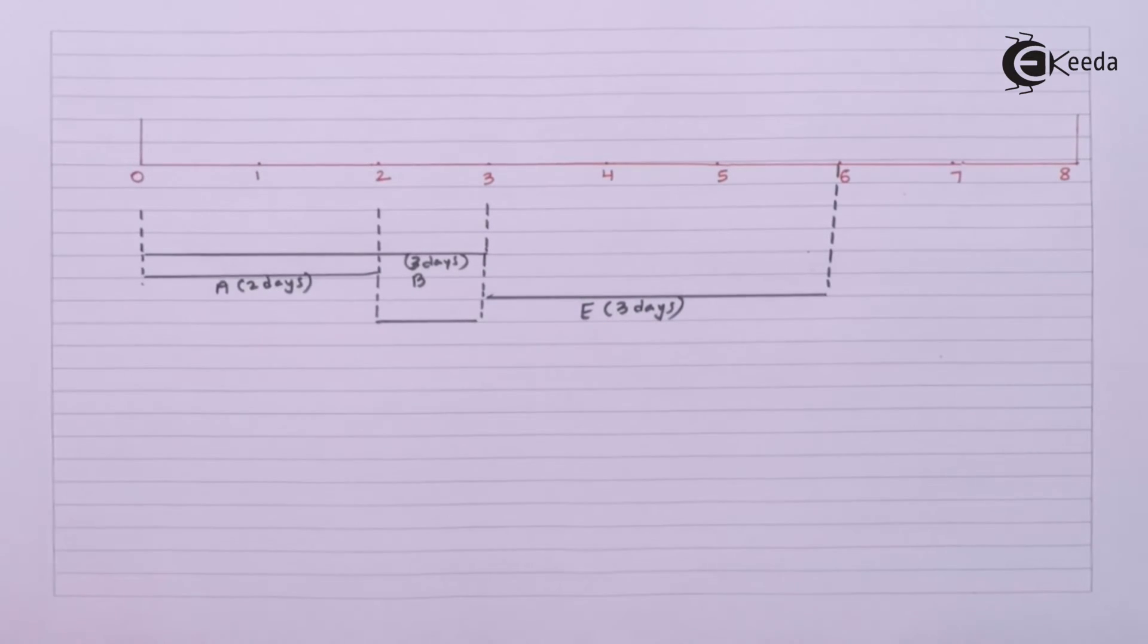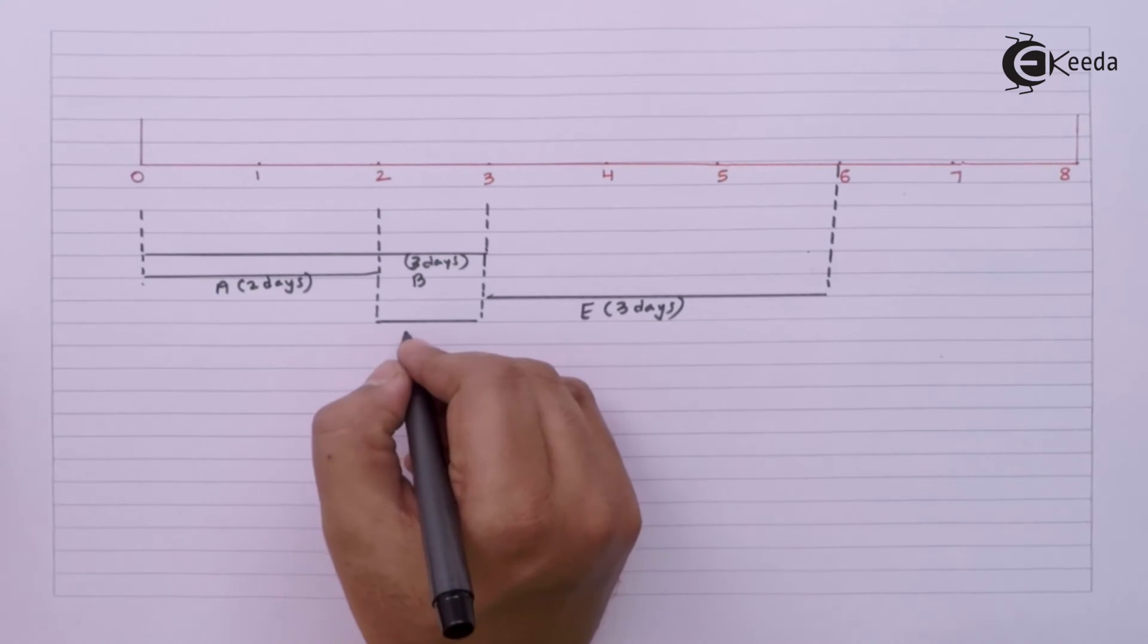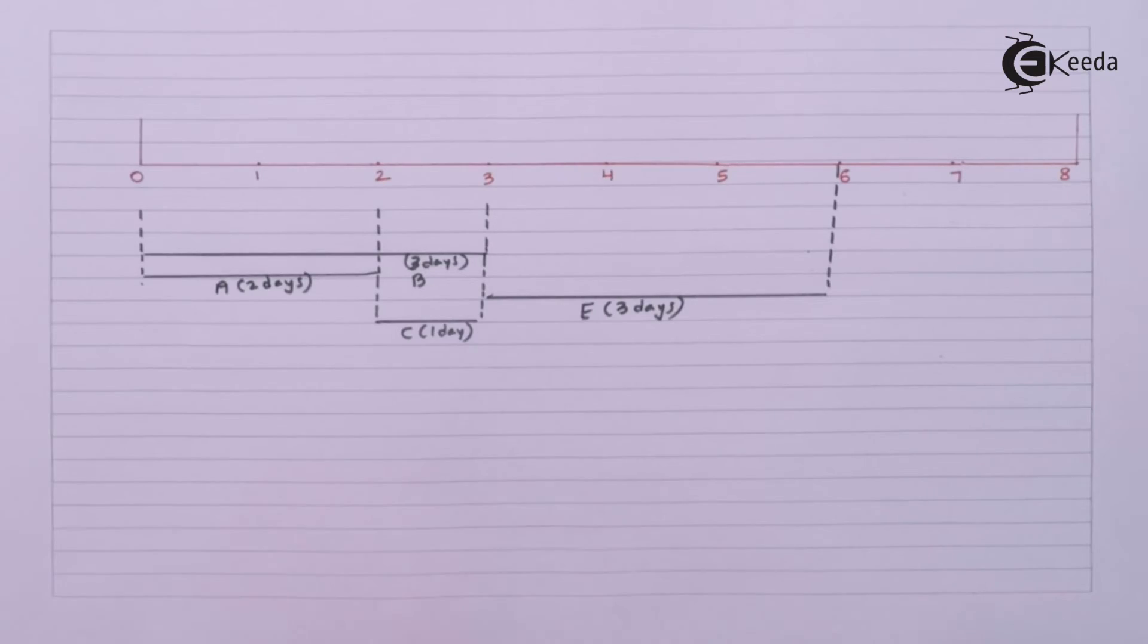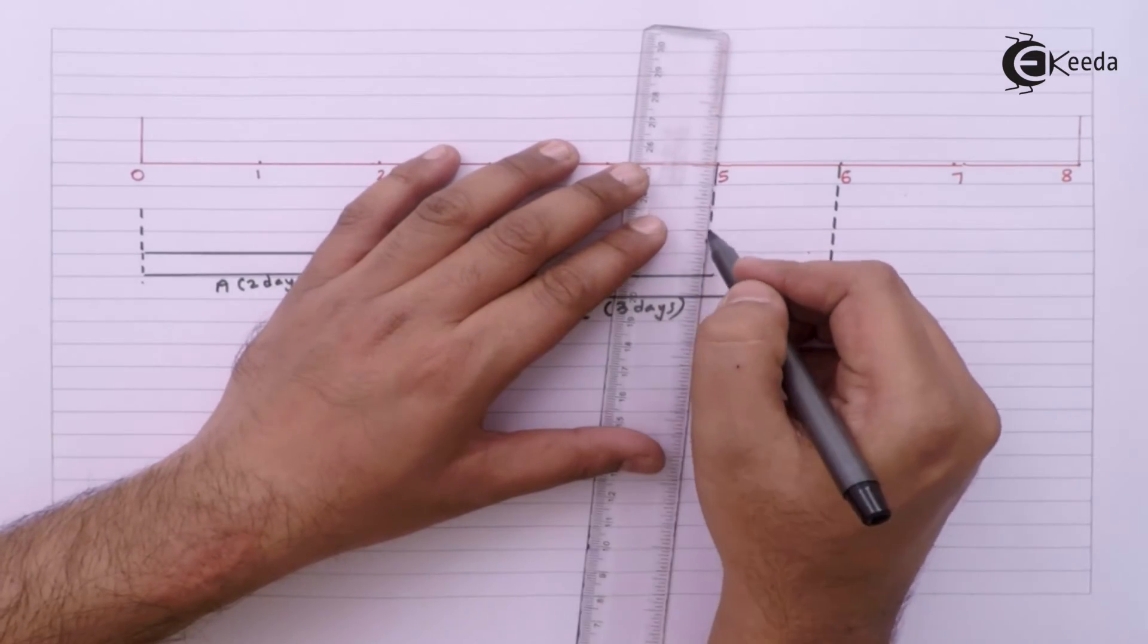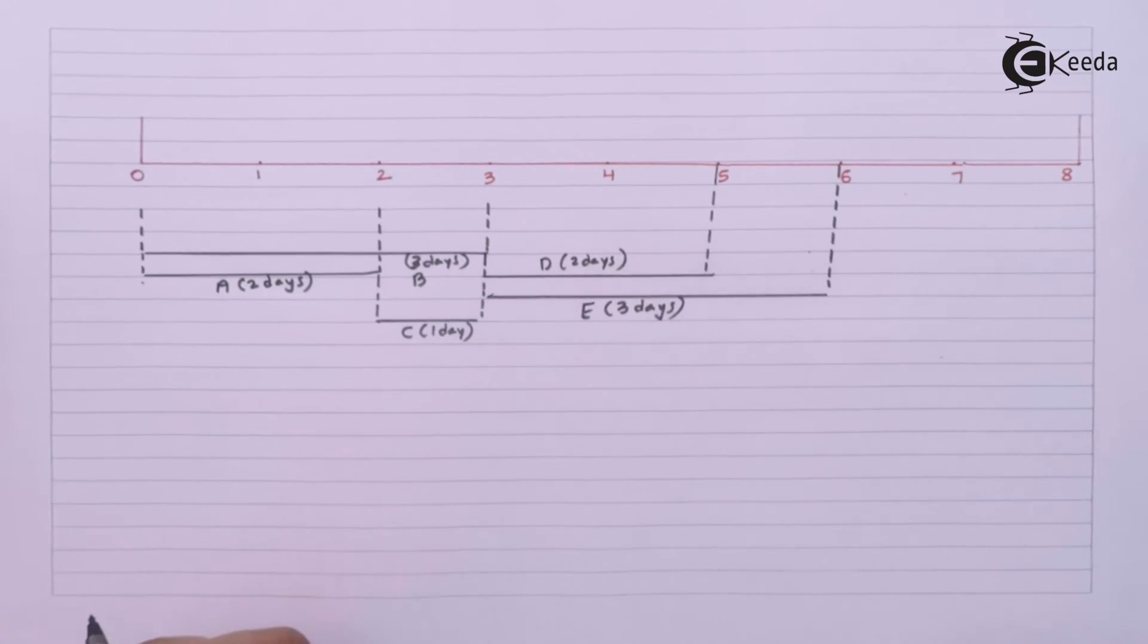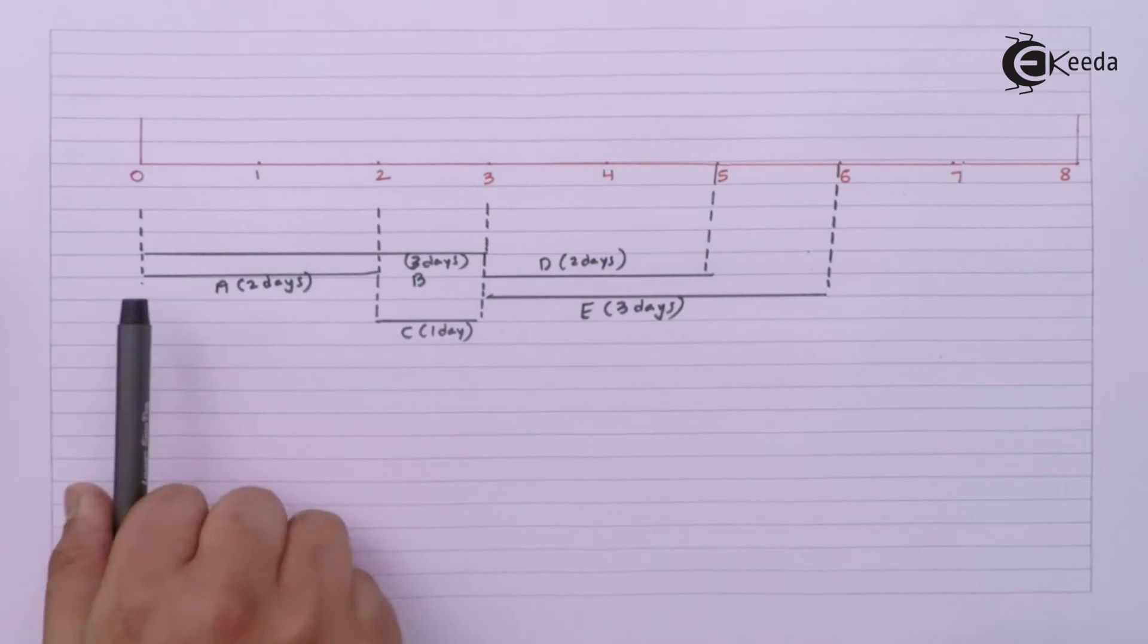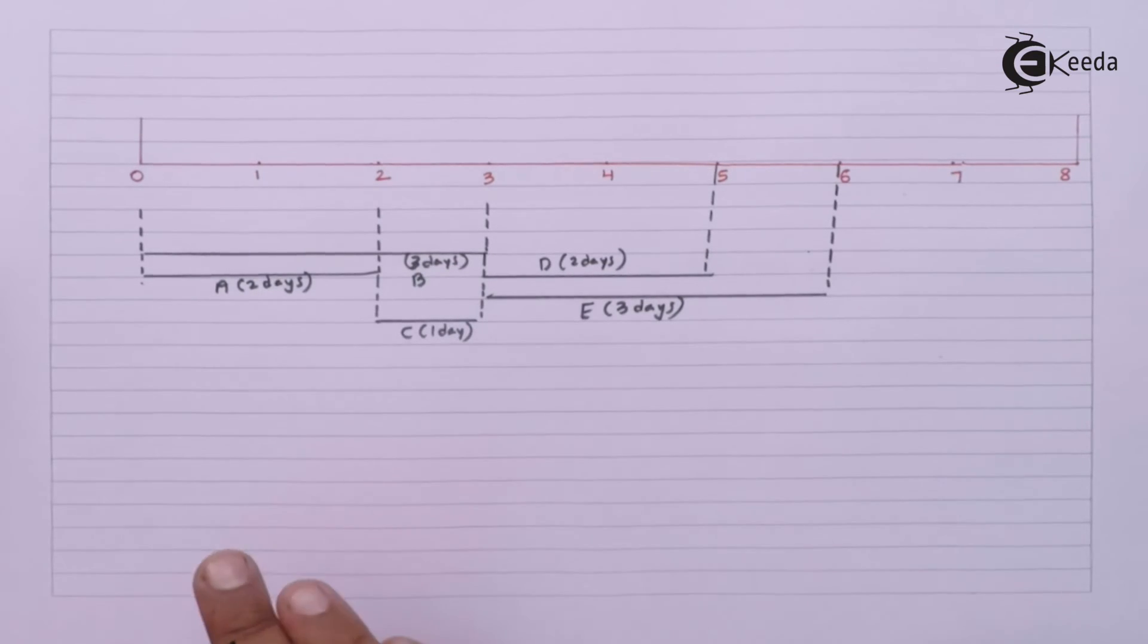After completion of A for 1 day, we have C. And then we have D after completion of B for another 2 days. So I will start with A for 2 days. We started with B for 3 days. After A we started C for 1 day. After B we started D for 2 days. Now after A, B, C, D, and E, we have just F.